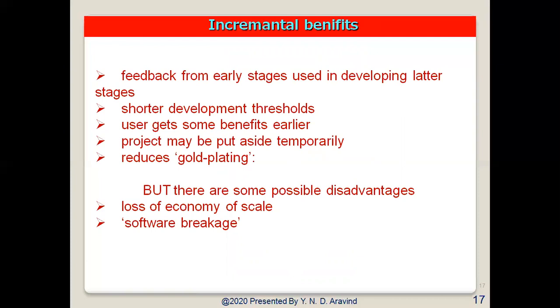Here a series of mini waterfalls are performed in the incremental model, where all the phases of the waterfall development model are completed for a small part of the system before proceeding to the next increment.